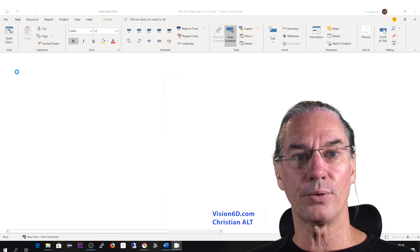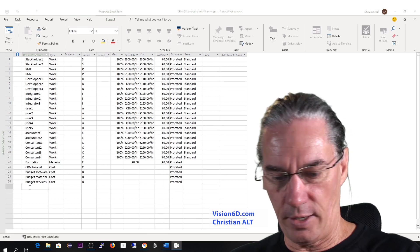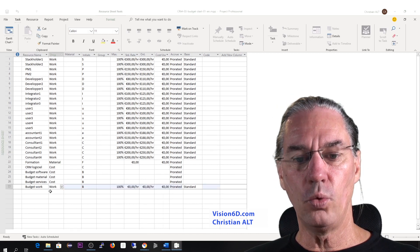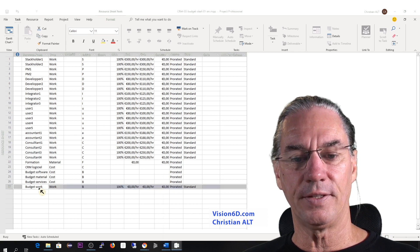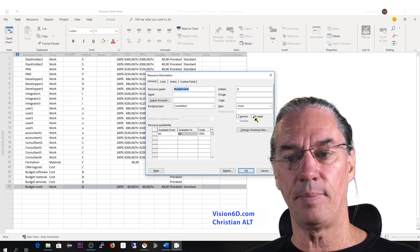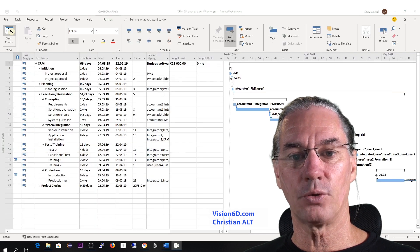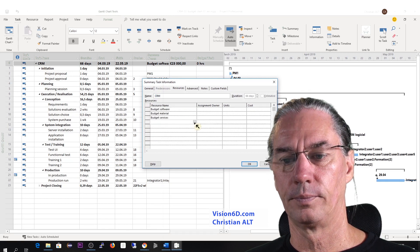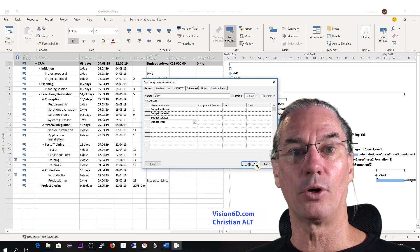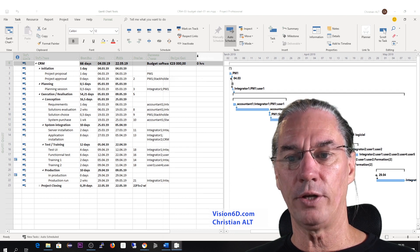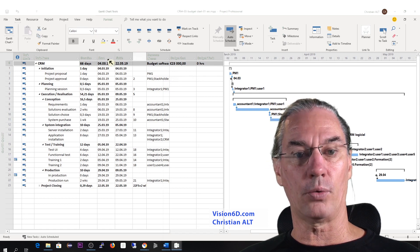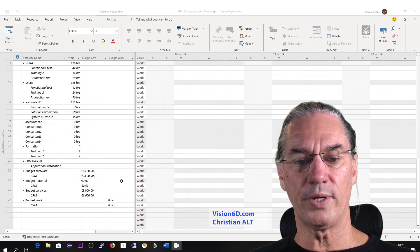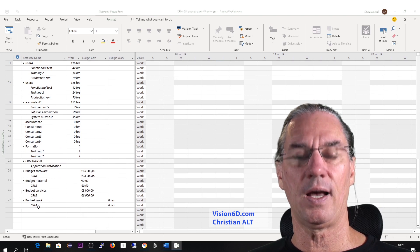So we are going to bring in the working hours, and for that we need to bring in a new resource. I'll go back to the resource sheet and create a budget which I will call 'work'. This budget work will be of type work, and I will define this resource as a budget resource. The next step is to go back to the Gantt chart, take the summary task, and add that new resource.